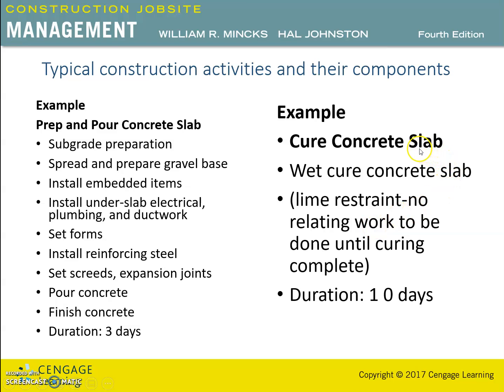Another example of an activity is cure concrete slab. So it is a wet cure concrete slab, time restraint, no related work to be done until curing is complete. So this activity may take up to 10 days, but you can see that this is more or less a waiting activity where not much physical work is performed. However, a lot of physical work is performed in preparing and pouring the concrete slab. So the nature of the activities on the construction site may be different from activity to activity.